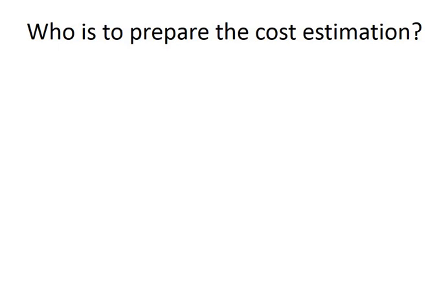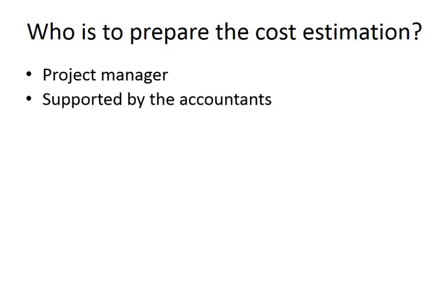So, who is to prepare the cost estimation? Well, a project manager may be the right person, the future project manager, or he or she should be supported by people like accountants because they have the numbers coming from the previous projects. And sometimes we even use a professional cost planner, especially when the project is going to be big and complicated and we need somebody independent to do it.